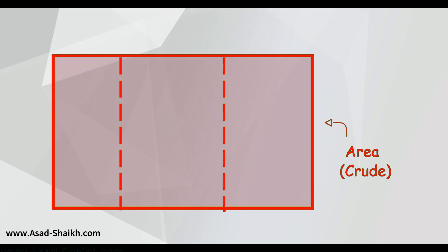Once you have the area, the area is also further subdivided. The area is further subdivided into units. So for example if you see here for the crude unit you have maybe unit 1, 2, 3 which is basically trying to crack the crude into various components in unit 1, unit 2 and unit 3 for example. So this is how the area and the unit comes into picture.